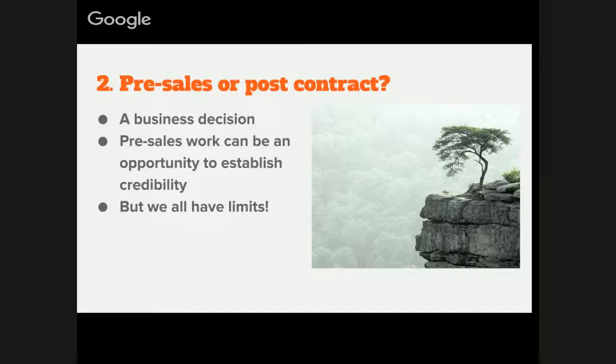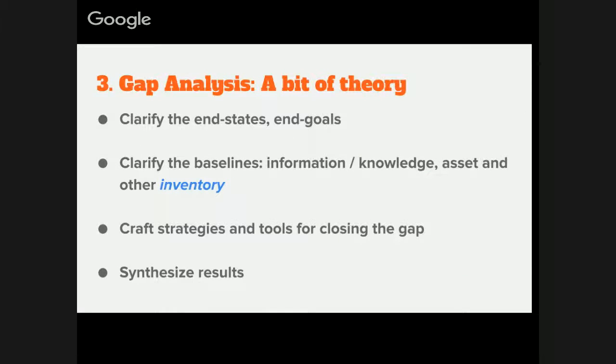It's a very tricky thing, and putting a name to it is sort of the point of the talk here. If you see that scenario where it's like, well, we don't even have confidence that we know the appropriate technologies, or you mentioned in passing, like, 9 API potential integration points. Are those documented? No. Okay, so it's just a question of deciding how far to go before you pull the plug and say, we'd love to work with you, but we need a discovery phase. We're not going to respond to this RFP as it's been framed. So just keep that kind of thing in mind.